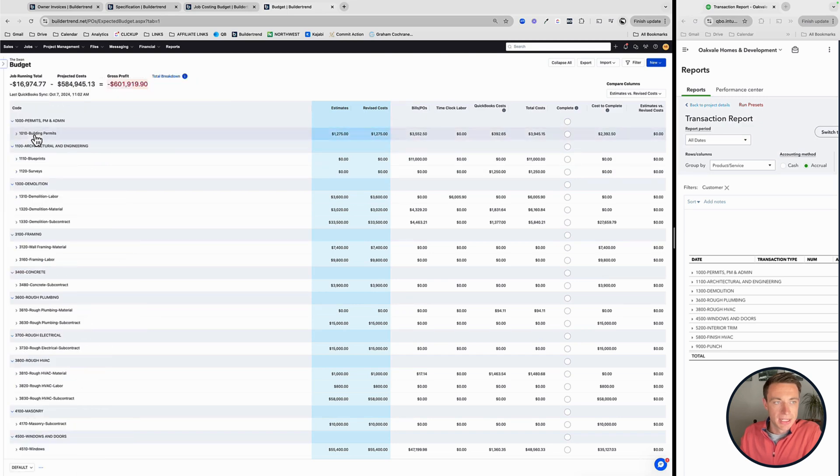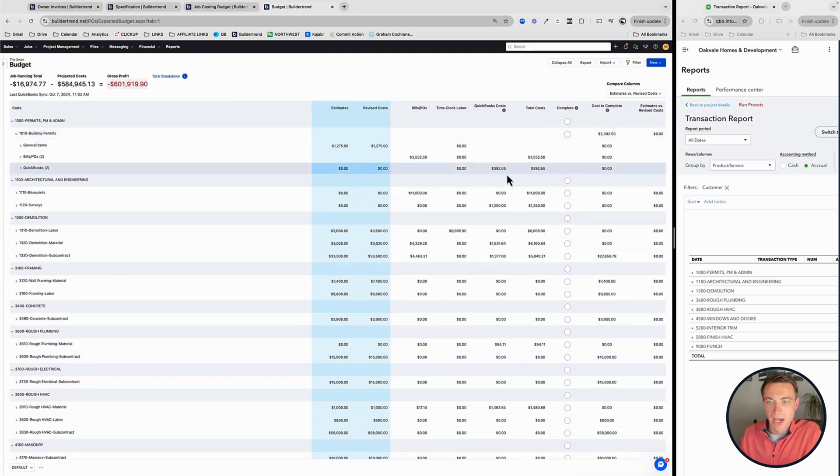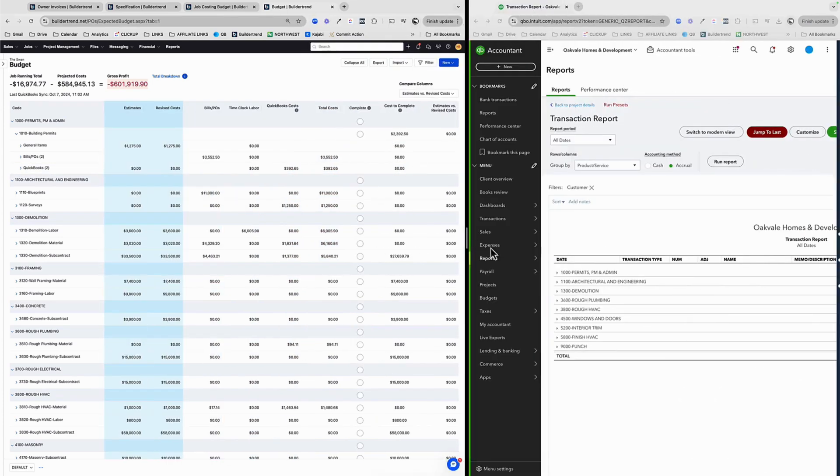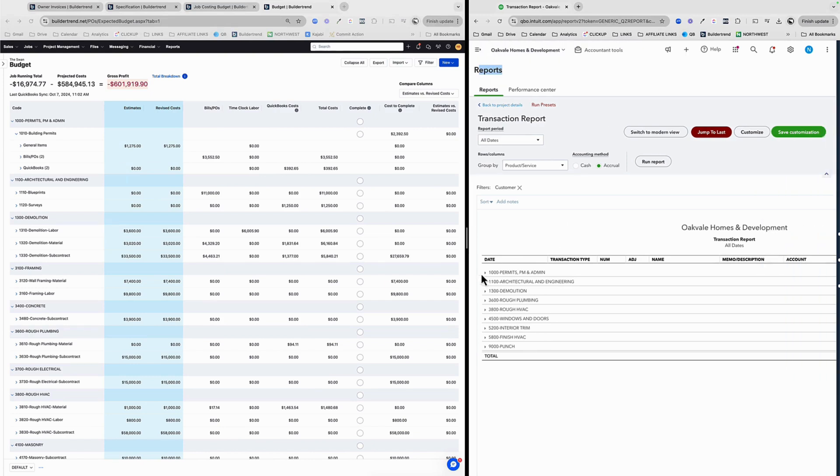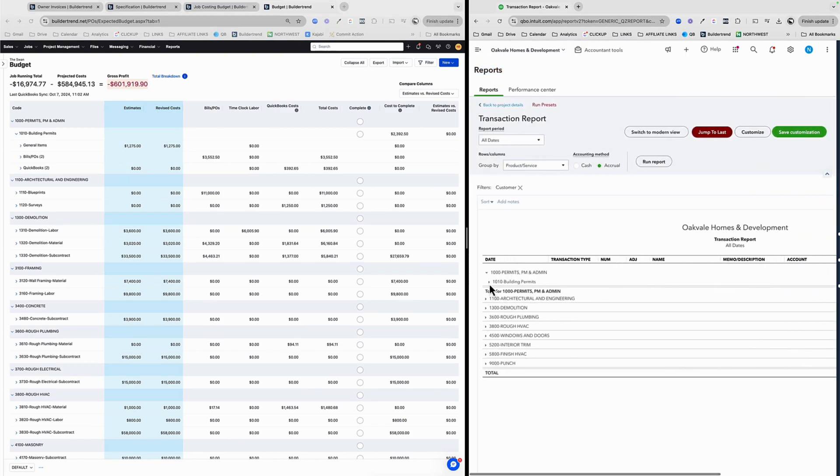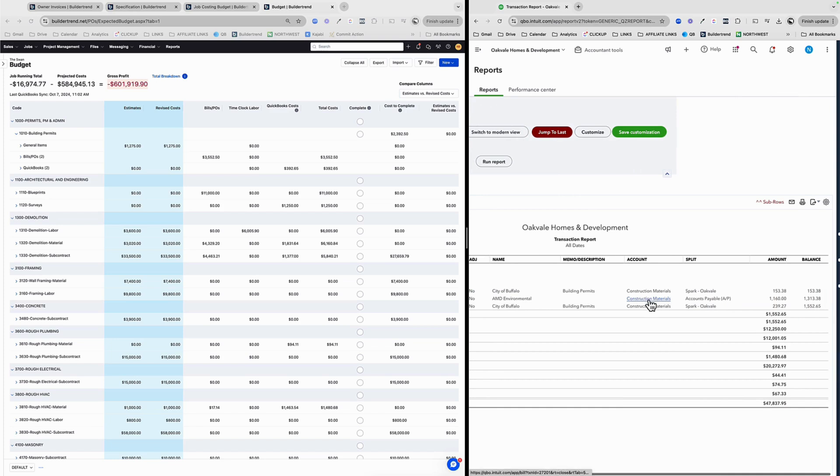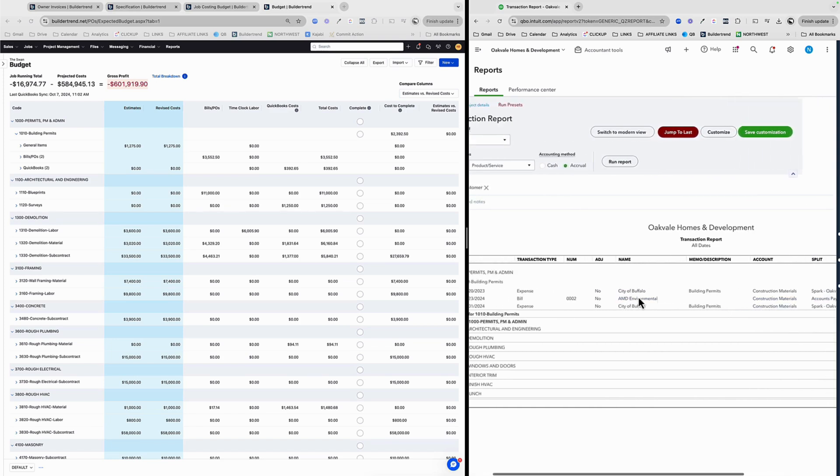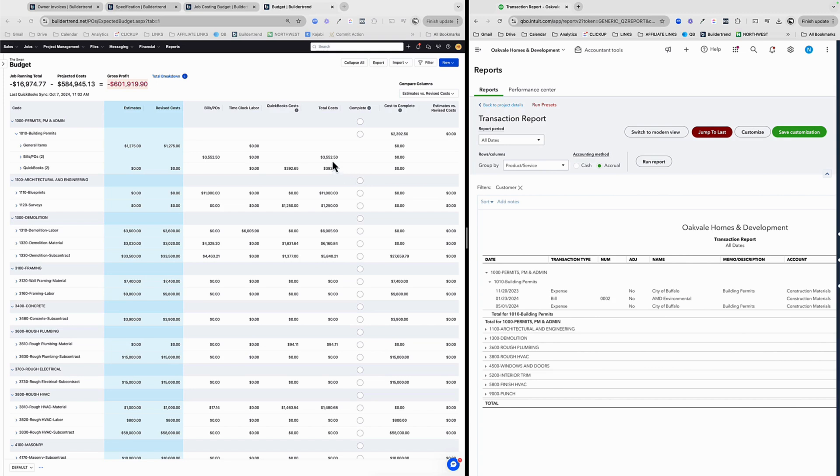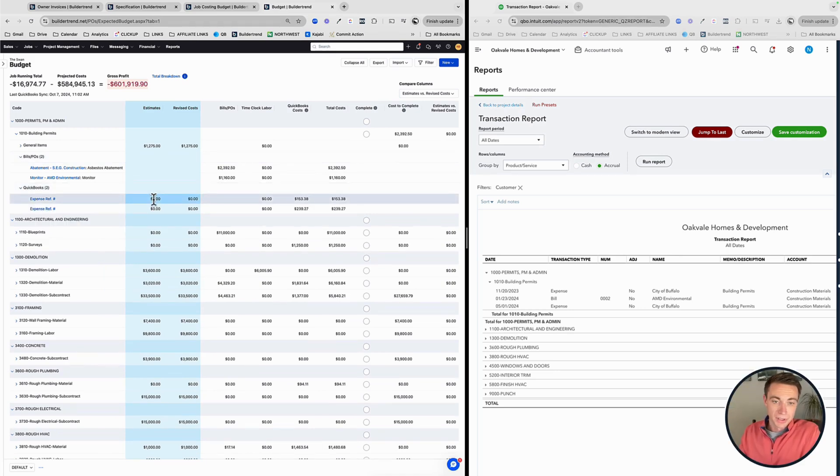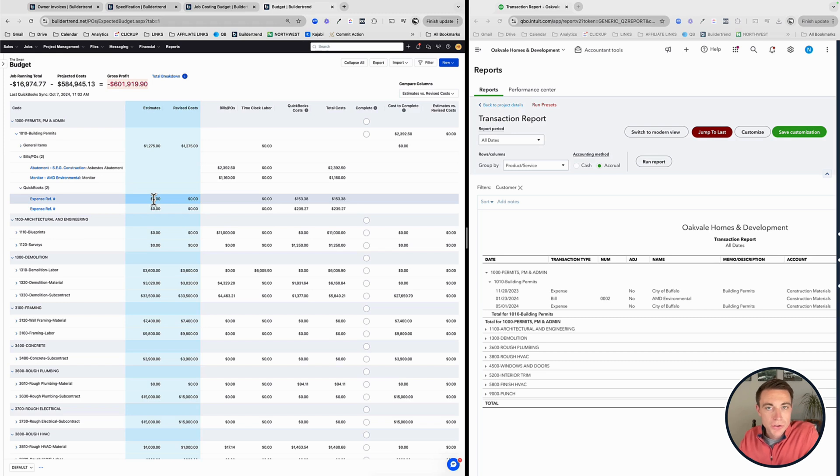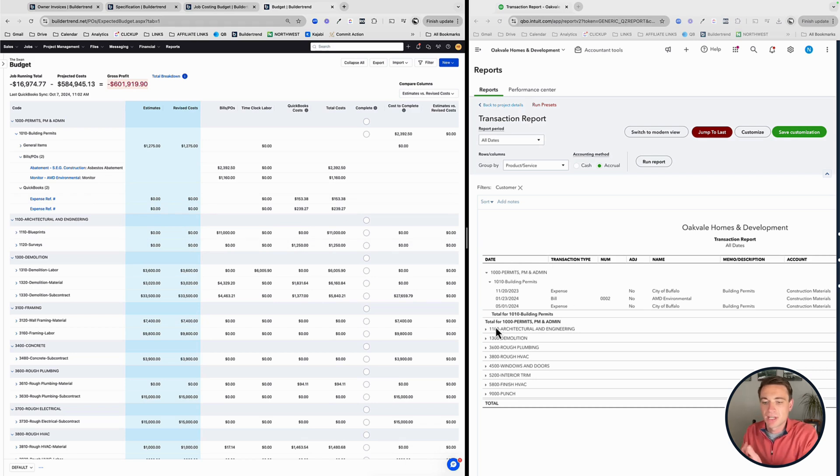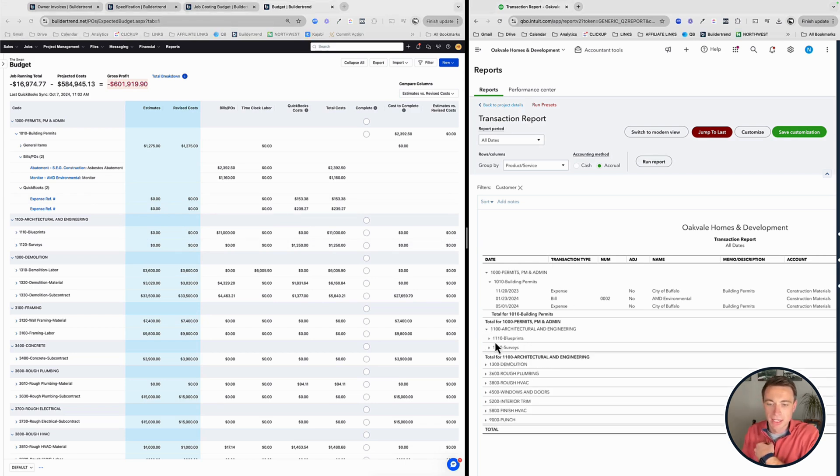So I can see here that my building permits, I've got nine, there are 392 here. And if I look at QuickBooks, there's my three. So I got 392 on QuickBooks costs and then I got some bills and POs as well. So the link is really, really strong and that's what we want to be in there because there's two different situations where we want to track expenses. One is within builder trend itself. Bills can be tied to the schedule. So powerful as a schedule moves in or out, your due date on your bills move, but we have those day-to-day transactions. Those are going to be tracked within builder trend or I'm sorry, within QuickBooks and brought over.